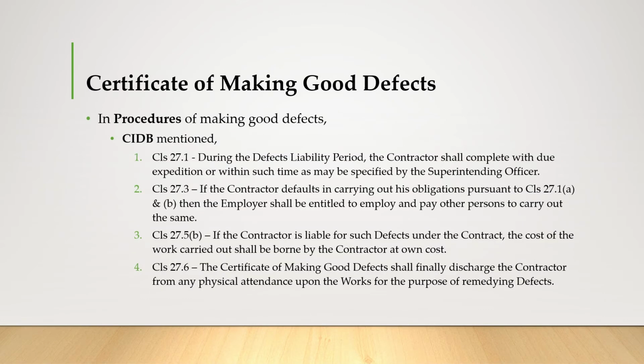So in the procedures of making good defects in CIDB, it's mentioned in clause 27.1. During the defects liability period, the contractor shall complete with due expedition and within such time as may be specified by the SO. Secondly, clause 27.3. If the contractor defaults in carrying out his obligation pursuant to clause 27.1 A and B, the employer shall be entitled to employ and pay other persons to carry out the same.